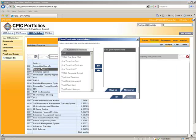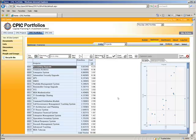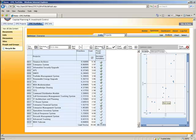Clicking next, we want to start doing some what-if analysis on this portfolio. What we'll do today is a simple what-if analysis based on cost. In this list of projects, you now see the cost of each project, and you see that if you did all these projects, it would take almost $60 million, $59.88 million. Now most of the time we don't get the exact budget that we want. So what might we do? Start with last year's budget of $35 million. So let's type $35 million and hit next. And we now see that for $35 million, certain projects we can still do, and certain ones will have to go away. We still maintain 80% of our portfolio value, which is still pretty heavy, considering we have nearly half the investment that it would take to do the whole item.